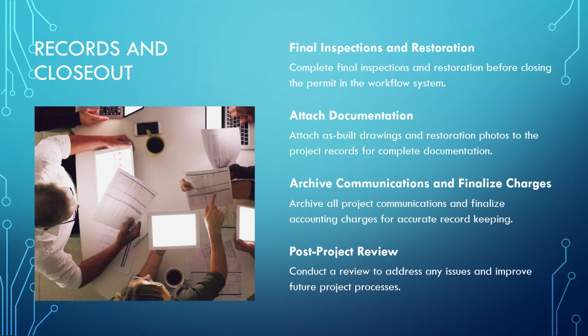After final inspections and restoration, close the permit in the Workflow tab. Attach as-built drawings and restoration photos. Archive all communications and finalize accounting charges. Conduct a post-project review if issues arose to improve future processes.